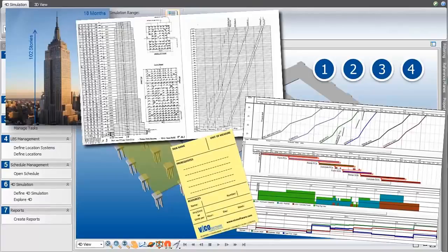We're able to highlight planned work by location, identify wasted opportunities, the bottlenecks and inefficiencies, the starts and stops. We're then able to optimize the plan and start with the right number of resources on the right date. We ensure continuous flow. And adding BIM and lean principles to this method just takes it a step further.